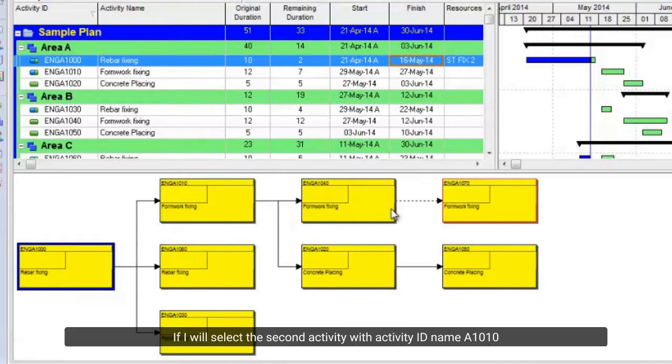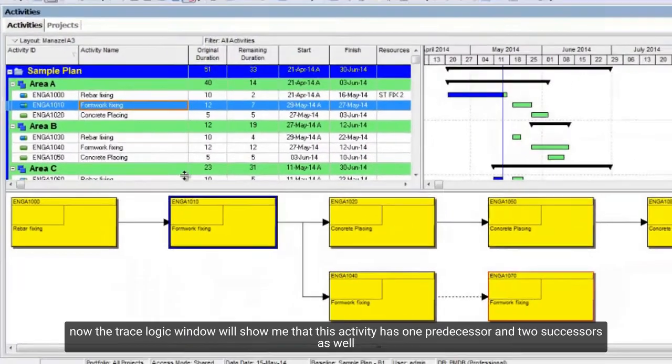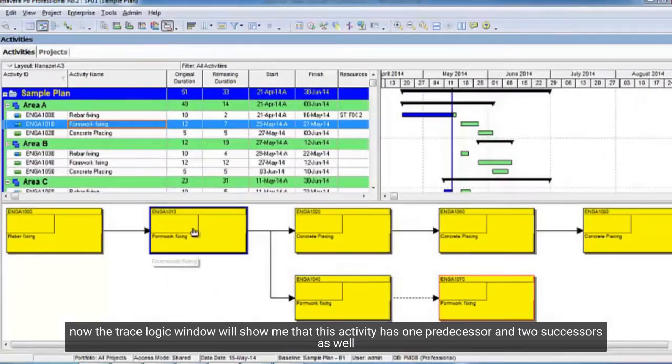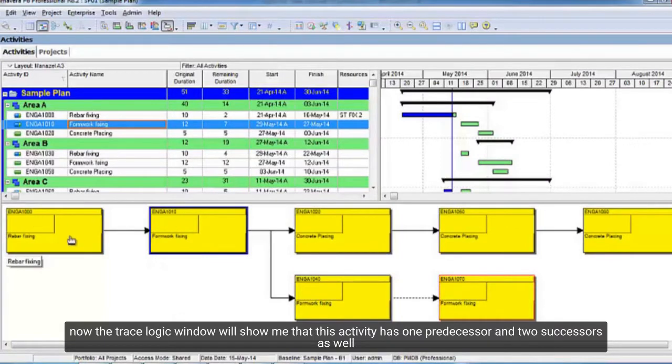If I select the second activity with activity ID name A1010, now the trace logic window will show me that this activity has one predecessor and two successors as well.